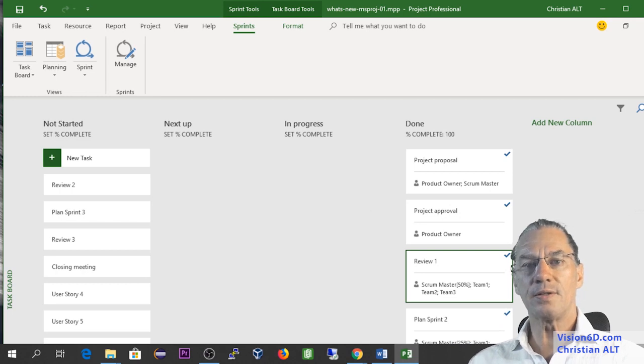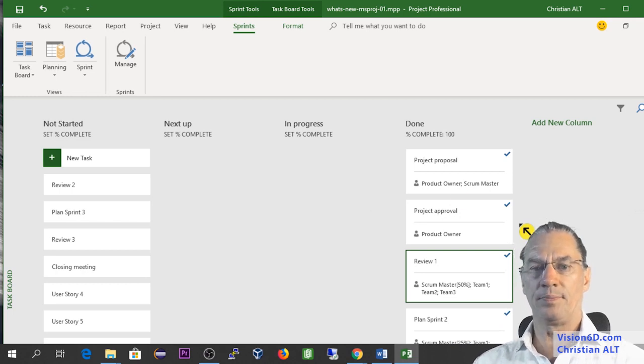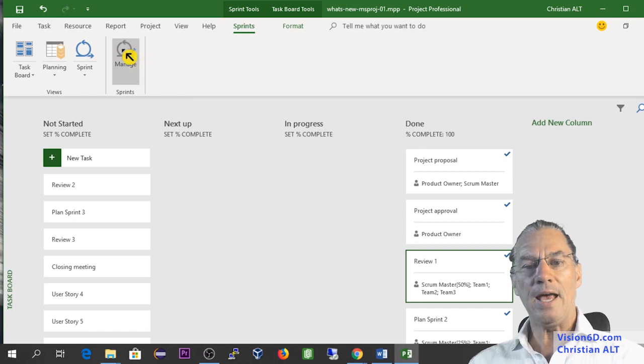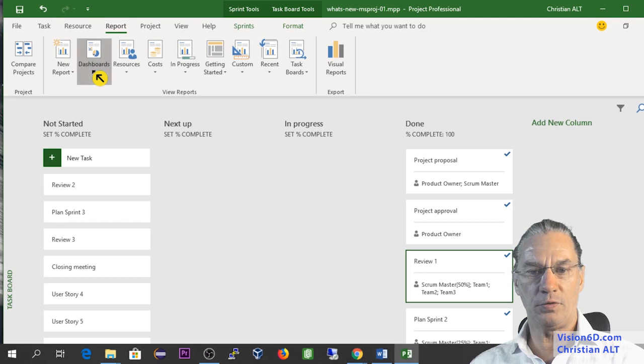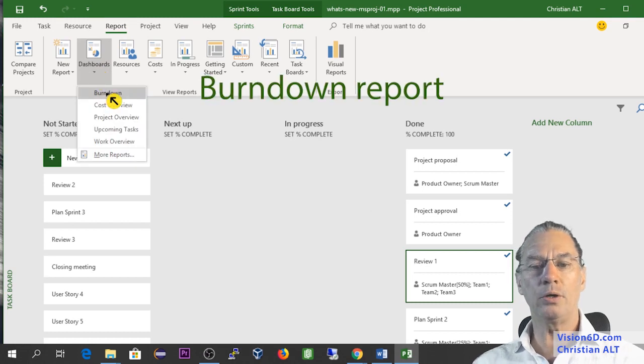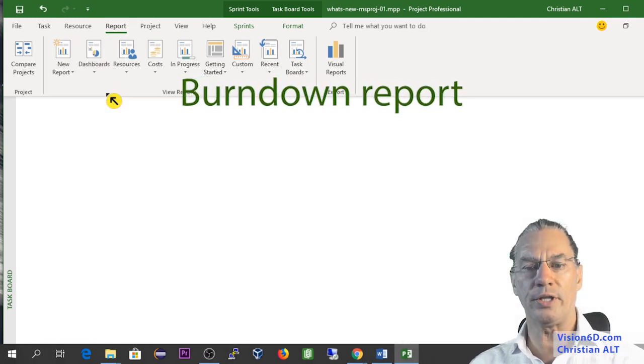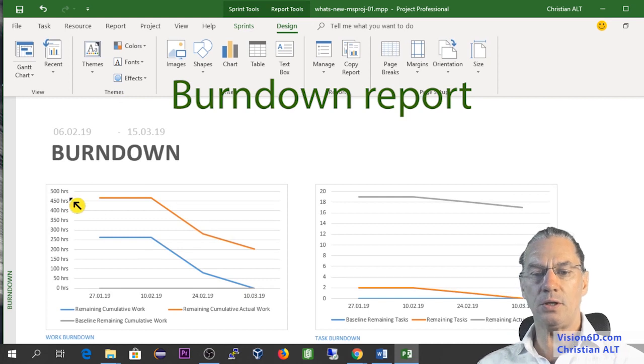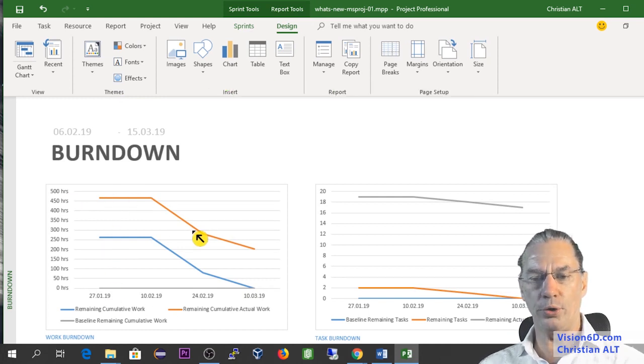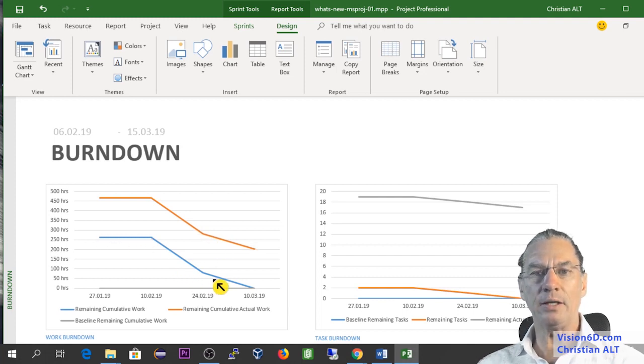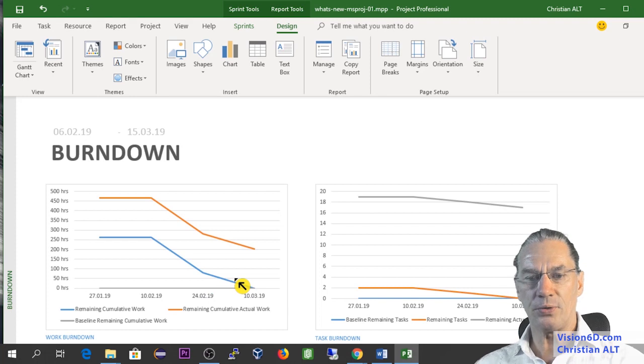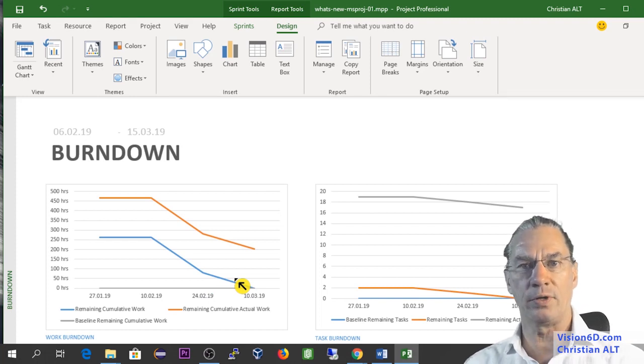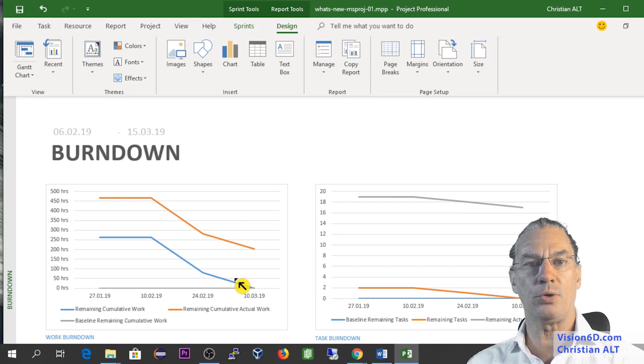With this, we've completed the second Sprint. I will now go and give you an overview through reports of what we can already see from our work. And we'll go and look at what is called the Burndown. And you see here that we have the remaining work, which is in orange. And here it's the remaining cumulative work. So this is one of the new reports we also have with that version of MS Project.